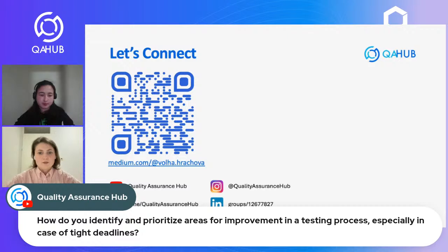And in order to do so, you need to find the most risky areas and apply risk-based testing at this stage, because that's the quickest fix. If you are close to the release and you have a big number of bugs, and you are very tight on schedule, just implement risk-based testing and pay special attention to the high importance areas.